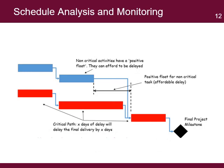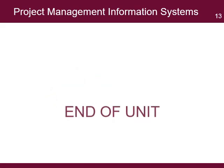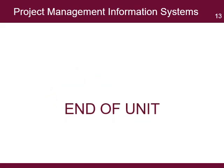For example, an activity was estimated to take 30 days to complete, but an external factor caused a delay of two days. If the activity is on the critical path, the entire project will be delayed by two days. The project manager will need to evaluate how critical the delay is and find alternatives, such as adding resources on the critical path, in order to reduce the time needed and bring the project completion to the planned date.